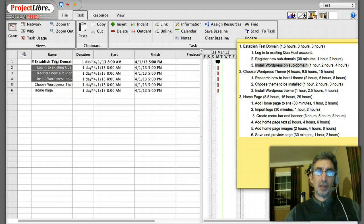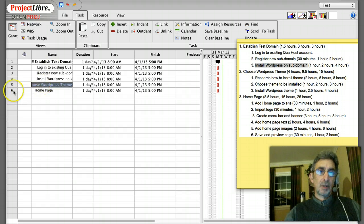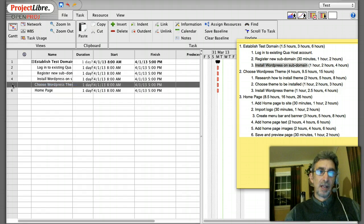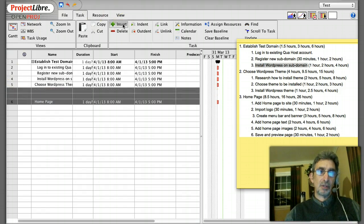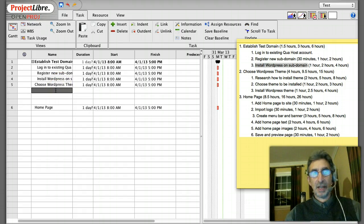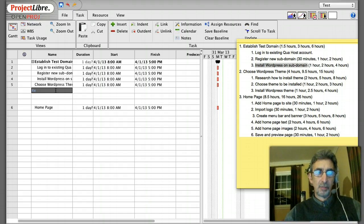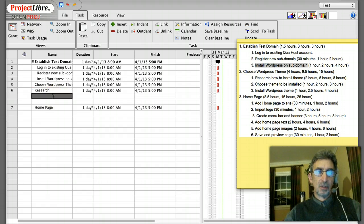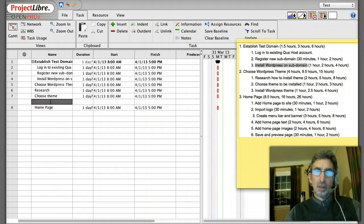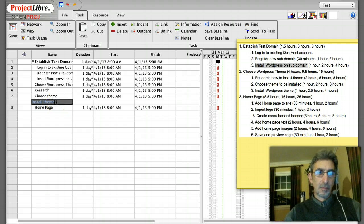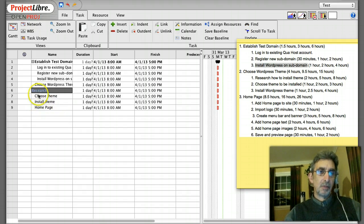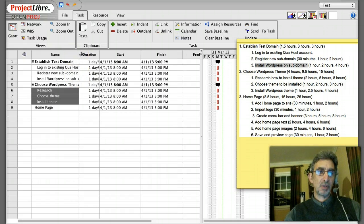'Choose WordPress Theme' has three tasks as well, so I'll go here and insert to make room for them. I'll quickly put these in: research, choose theme, install theme. Then for the home page milestone, I shift-click these three and indent — now all three items belong to 'Choose WordPress Theme.'